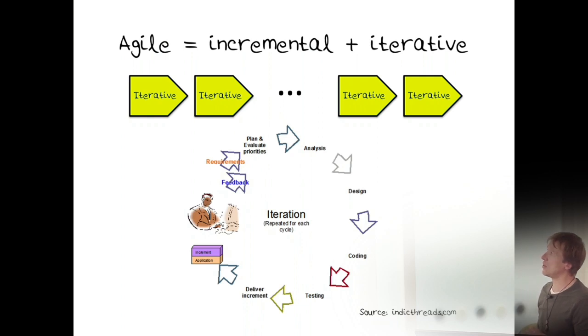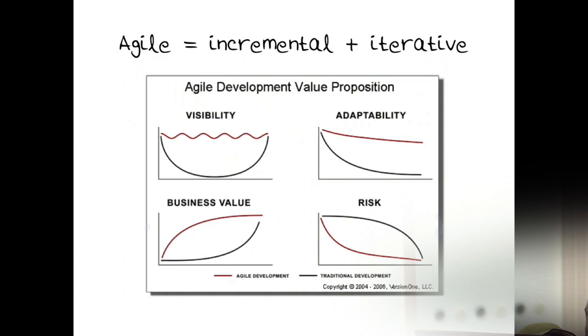So multiple iterative is agile. And compared to traditional project management, you have much more visibility here. Imagine as a product manager, I'm interested in seeing how things are going. If you start by building the back end, you won't be able to show anything until you're done. Here, you will be able to show them small pieces of functionality all along and get their feedback on this.